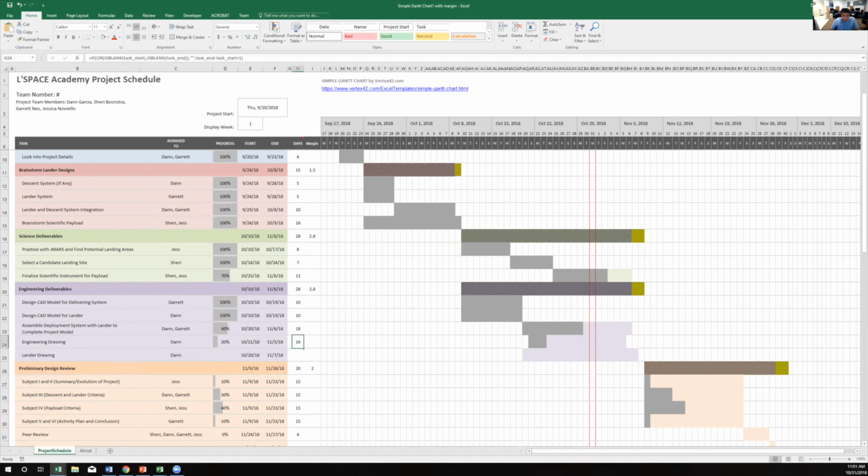This is also within the cell arithmetic. So if you want to have that difference in days calculated automatically, you just need to grab this bottom right-hand corner, drag it down, and it'll do the difference between the 7th and the 20th. So maybe Dan started on the 20th. Right now is the 31st, for example, so maybe he's 60% of the way done. And then it adjusts it to the scale. This red line marks today's date, so just be aware of that. So it's as simple as just inserting a new row.